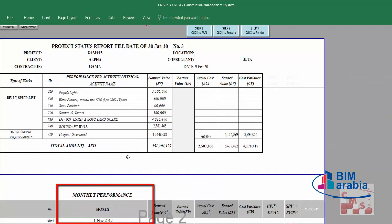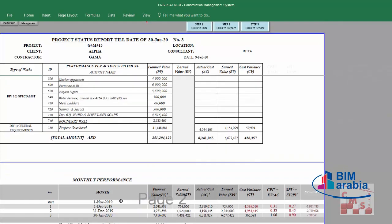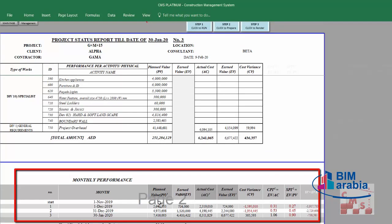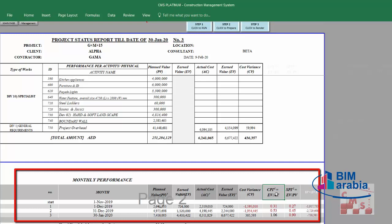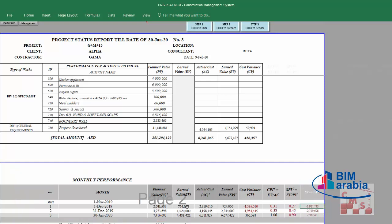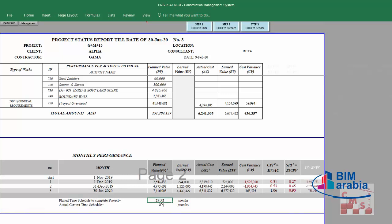CMS also provides overall performance as a monthly performance breakdown. For every month we can see the planned value, the earned value, the actual cost, the total cumulative earned value, and the cost variance. We also have the CPI — cost performance index — for this month and the previous month, the schedule performance index (SPI) for this month and the previous month, and the schedule variance for each month. Here we see the total project duration and the current month.